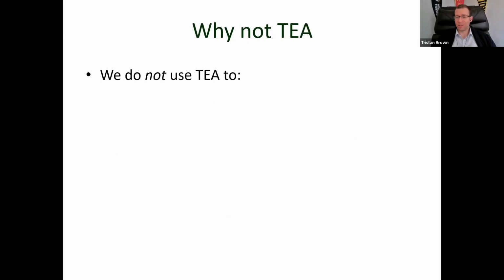Okay, so TEA does have a lot of limitations, and there are certainly going to be a number of scenarios where you do not use TEA. This is not going to serve as a replacement for a site-specific cost estimation analysis, right? So if you've decided you're going to build this $500 million cellulosic ethanol facility, you know where you're going to build it, you have everything figured out, you need to know how much it's going to cost to build so that you can start securing the financing.